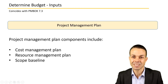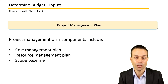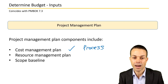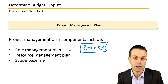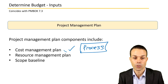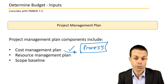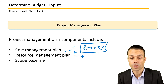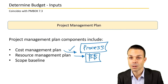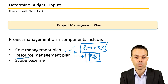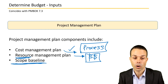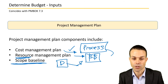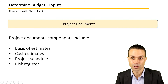Looking at the inputs in more detail: from the project management plan, we have the cost management plan — our process and framework for managing costs within our project, covering what tools we're using, who's involved, and our guidelines. The resource management plan covers who is doing the work, what the cost is, and what time frame they're needed. The scope baseline is also an input because we need to know what we are delivering, which impacts the resources and cost management plan.